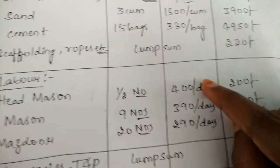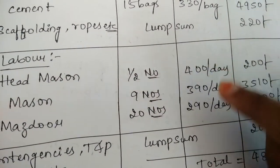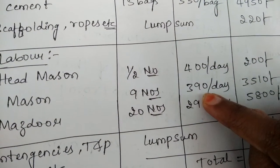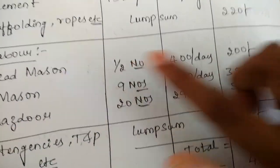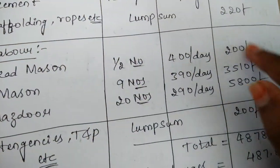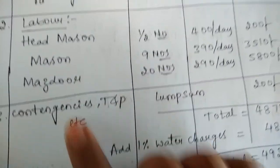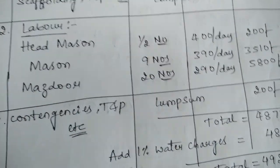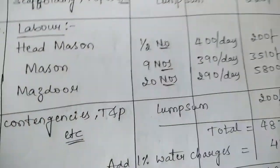The rates fixed for those laborers are 400 rupees per day for head mason, 390 rupees per day for mason, and 290 rupees per day for mazdoor. On multiplying these two columns we get all the labor amounts. For contingency and transportation charges, we assume a lump sum amount of 200 rupees.